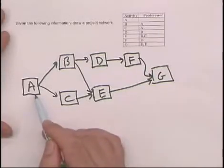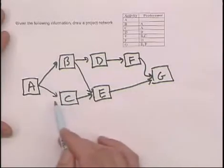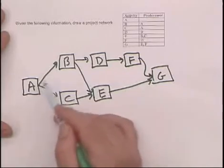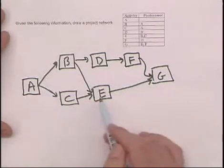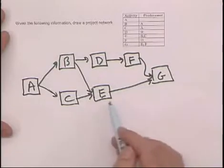A is a burst activity, which means more than one activity can start as soon as it's done, indicated by that arrow. And then E and G are both merge activities.